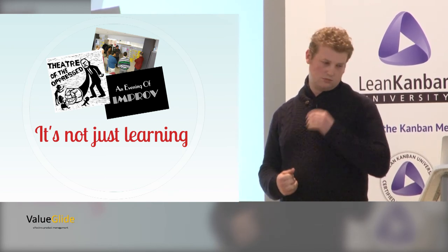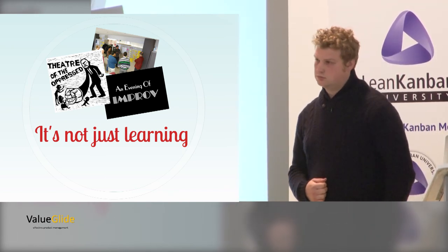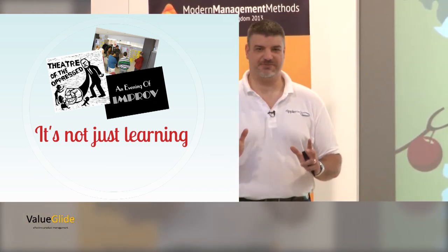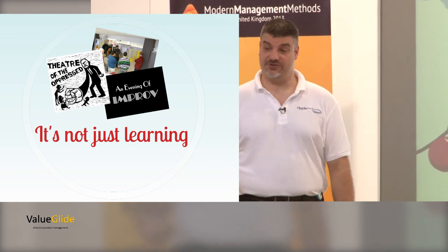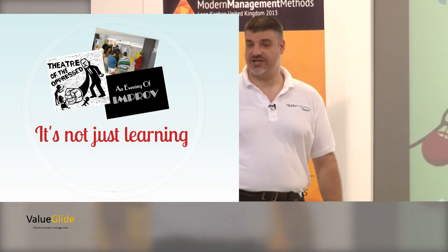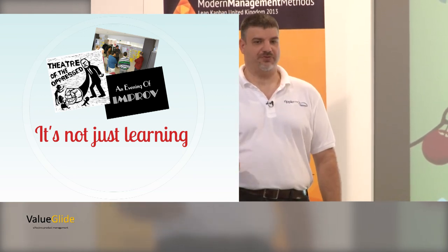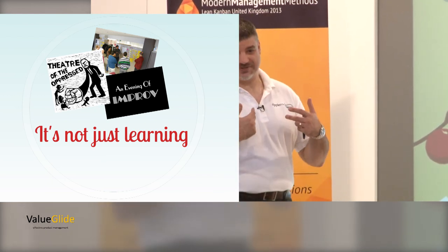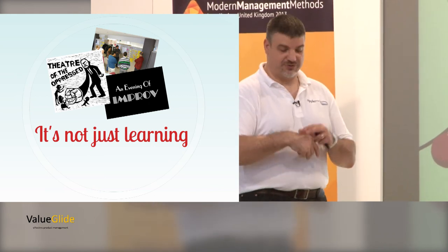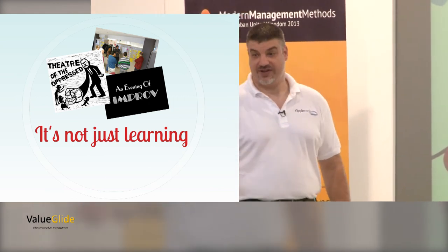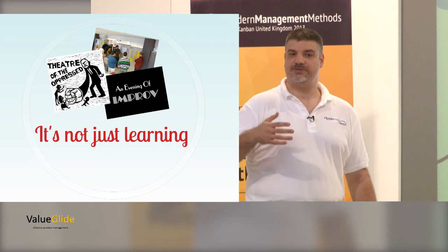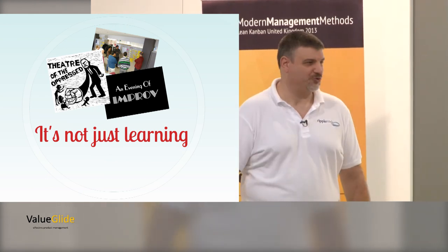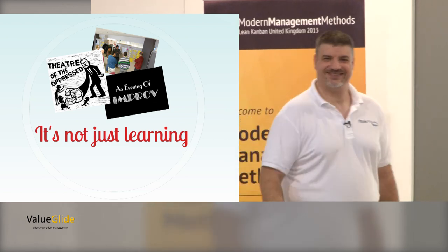One of the reasons Planning Poker works so well is it gets people to share the knowledge. I've got to say, I'm in the camp of no estimates, estimates are pointless. Estimation, though, is really valuable because it gets all that shared knowledge and it gets people talking about things they might not say otherwise. If you say 3 points, I say 13 points, we're going to have a chat because I know something you don't and you know something I don't. And at the end of it, everybody hears. So there's value in estimation, but the estimates are pointless. Talk to me downstairs about that. I could go on for a little while on that.